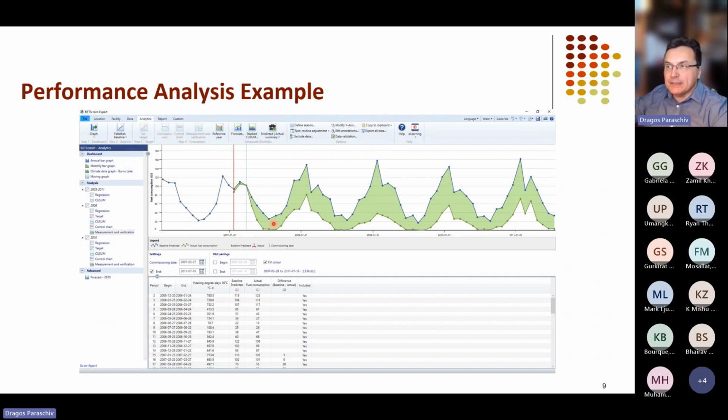But comparison of direct numbers prior and after the project is complete is not as easy as it seems, because other factors may impact our consumption. For that reason, we need to come up with an adjusted baseline consumption, which is this blue line, which represents what the energy consumption of the facility would have been without my project being implemented. And since this is an energy efficiency project, the energy consumption in this facility would have been higher without my project being implemented. And therefore, we now identify the savings as being this area highlighted in green in this chart here.